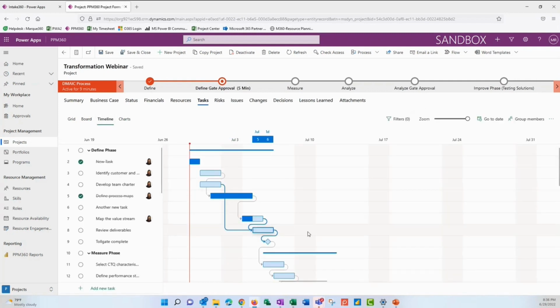One of the things that is really important when we're scheduling our tasks is entering in those dependencies. And I could have done those in the cards on other areas, but it's really fun to enter in dependencies with Project for the Web because you get this little interface you can interact with. So you can choose your predecessor and link it over with your successor. All right, you've got a couple different ways to do that.